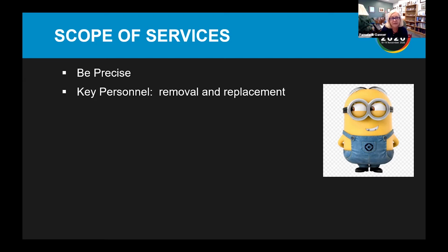The provision for key personnel. You will set forth in your contract who on your staff and you will be working on this project. So who has the authority to remove and replace the key personnel? You should have that authority. The client may push back and want approval. You may agree if the approval is not to be unreasonably withheld. However, you should retain the right or the duty to replace by a person of comparable competence. That should be how you would look at who should be replaced and with whom you can replace. We'll go on.